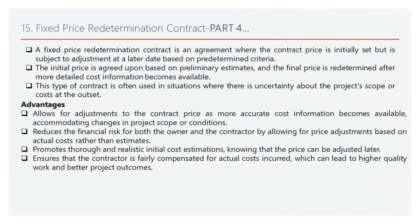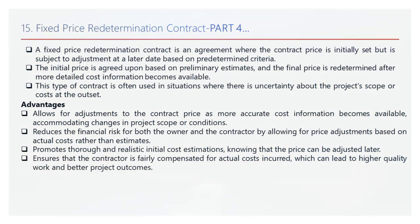Advantages. Flexibility for adjustments: as more accurate cost information becomes available, the contract price can be adjusted to reflect actual conditions, accommodating changes in project scope or external factors. Reduces financial risk: it reduces the financial risk for both the owner and the contractor by allowing adjustments based on actual costs rather than preliminary estimates. Realistic initial cost estimations: this approach promotes thorough and realistic cost estimations, knowing that adjustments can be made if necessary. Fair compensation for contractors: it ensures the contractor is fairly compensated for actual costs incurred, leading to higher quality work and better project outcomes.